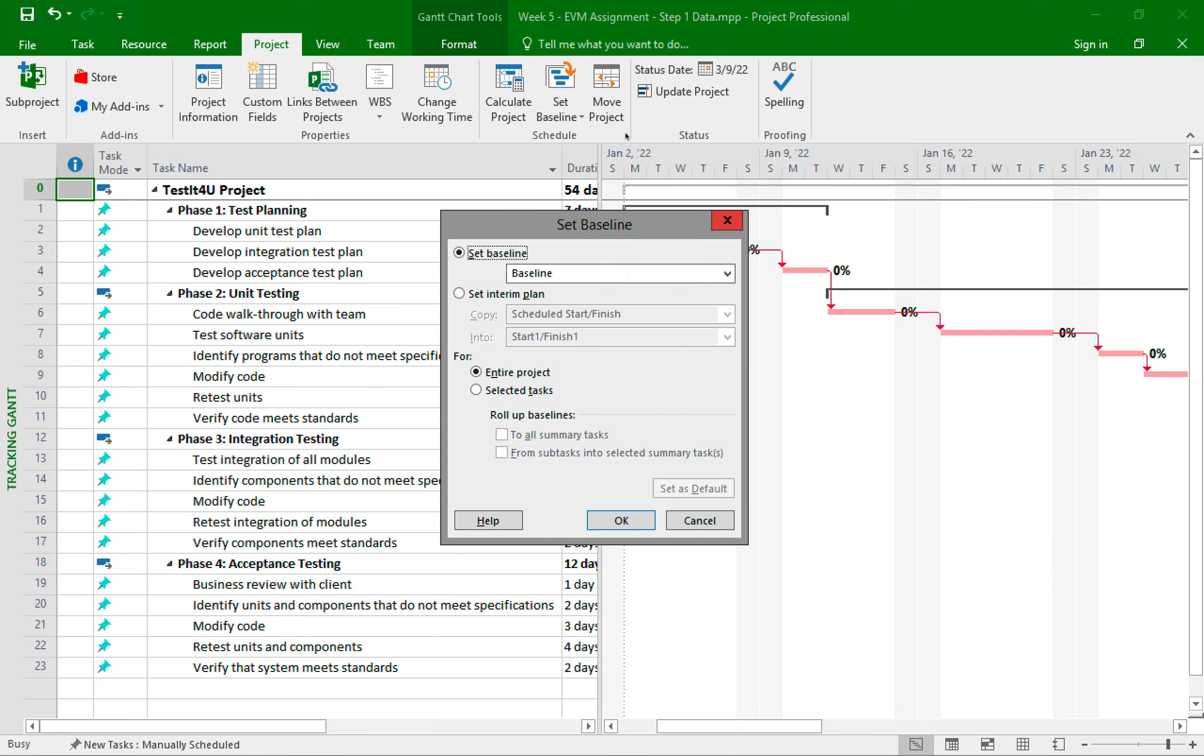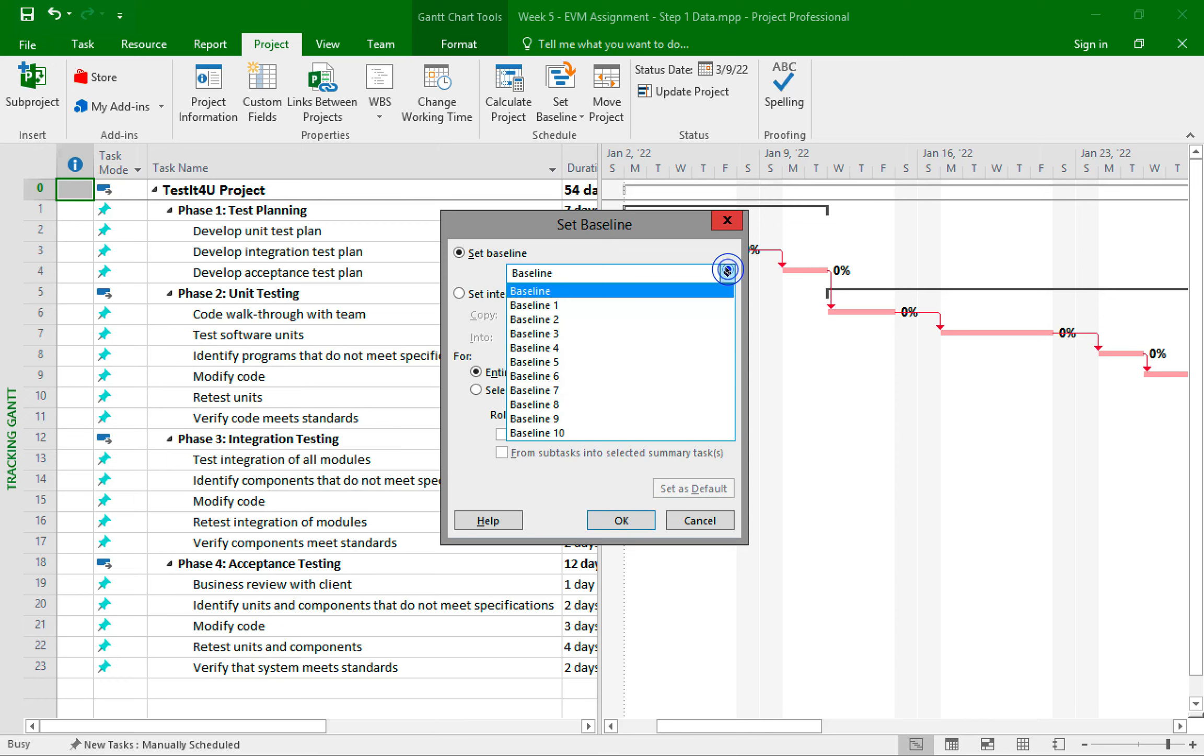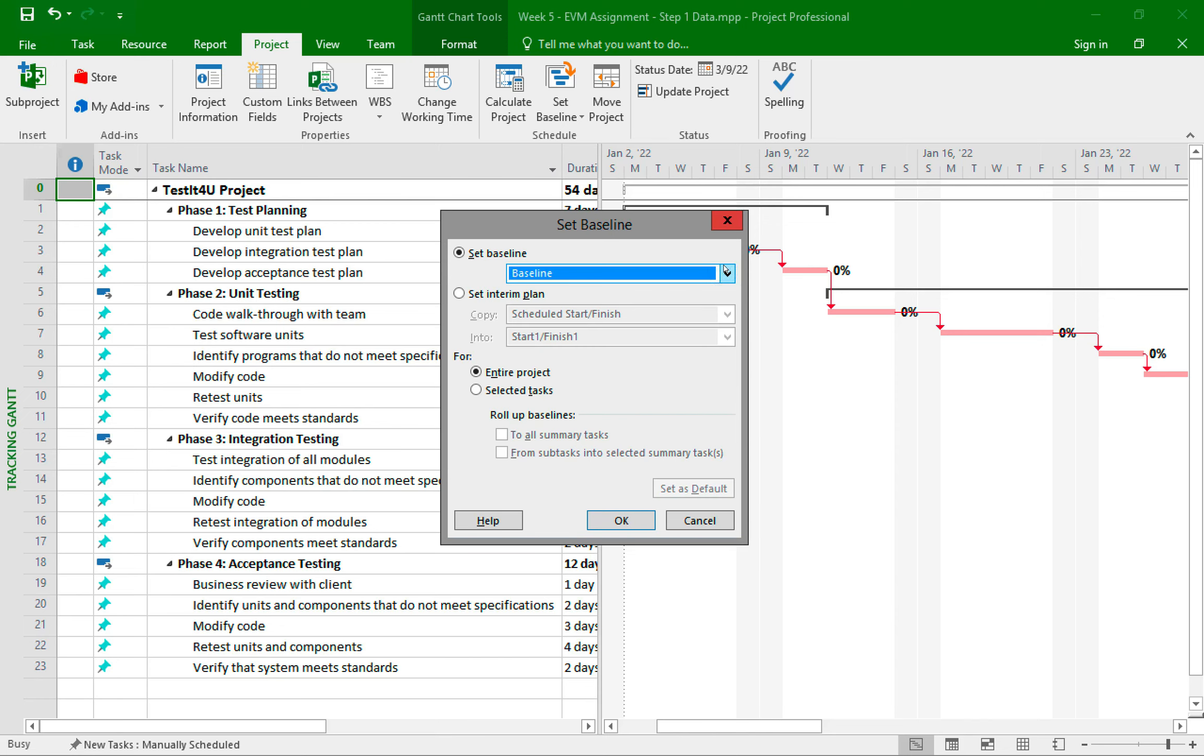This will open the set baseline dialog box for us. Here the default settings is to set the baseline for the entire project. We can also set multiple baselines. And instead of setting the baseline for the entire project, you can also set it for selected tasks. This might come in handy if you have a huge project and you want to just do a status check on a small portion of the project as opposed to the entire large project. But for this assignment, I'll keep the settings as is and press on OK.